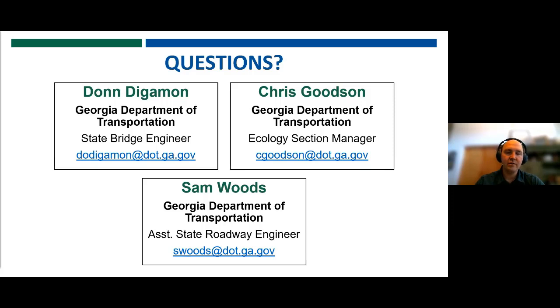If you need any right-of-way on an LIBP, then we're going to have to complete tech studies by that right-of-way date, so we'll definitely need it for those tech studies. Otherwise, we need to see those plans early on so that we can verify that all of our resources are delineated appropriately. But if you don't have right-of-way, we may not actually need that section 20 plan sheet until we receive lockdown plans, which is when we would, in most cases, be doing our AOEs. But hopefully in this new approach, it's very easy to develop those early on.